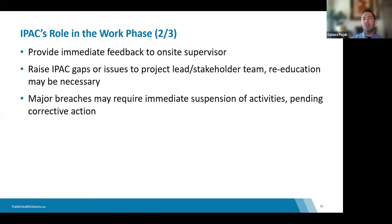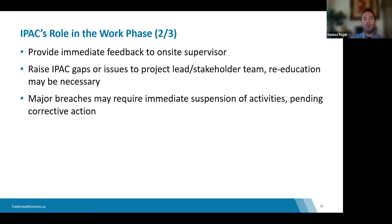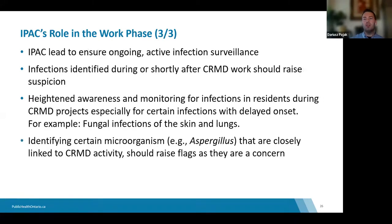During the work phase, it's important not to become complacent since contractors' plans for jobs do change. Work can balloon and become larger or more involved than anticipated, which in larger projects may warrant additional or expanded hoarding. You want to make sure you raise concerns and request that work be stopped if significant issues are identified.